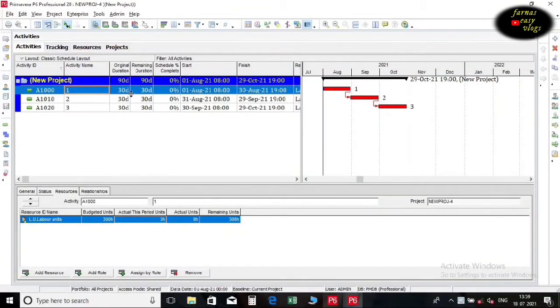If you use the Primavera P6 Store Period Performance feature, you can track actual units and costs to date. Storing period performance records and stores the actuals for the selected financial period, along with the earned value and planned value, so that you can track the previous periods. Also, you can compare the current and future trends.